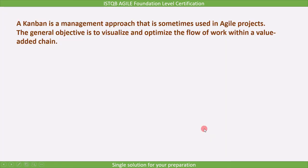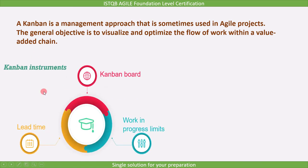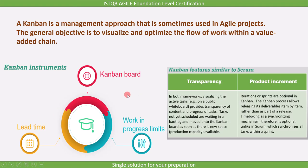To summarize: Kanban is a management approach that is sometimes used in Agile projects. Kanban utilizes three instruments — Kanban board, work-in-progress limits, and lead time. Kanban also features some similarities to Scrum, like transparency and releasing item by item.